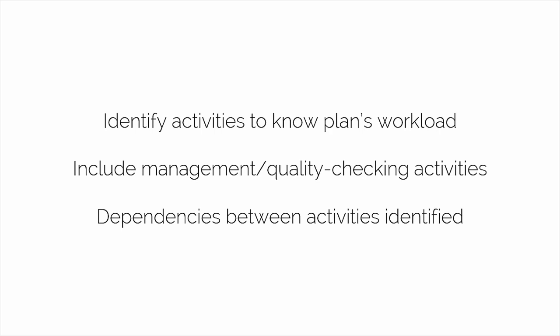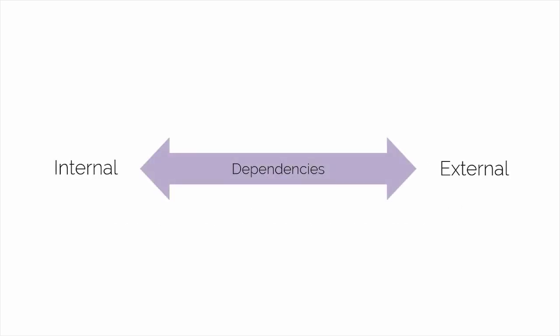The two types of dependencies are internal and external dependencies. For example, consider that a project of building a house may have many activities, such as laying the foundation, installing pillars, building walls and the roof, and then creating doors in that sequence. Now these activities will have dependencies. For instance, raising pillars is dependent on the foundation being laid, and building walls is dependent on pillars being installed, painting is dependent on the plumbing being completed, and so on.